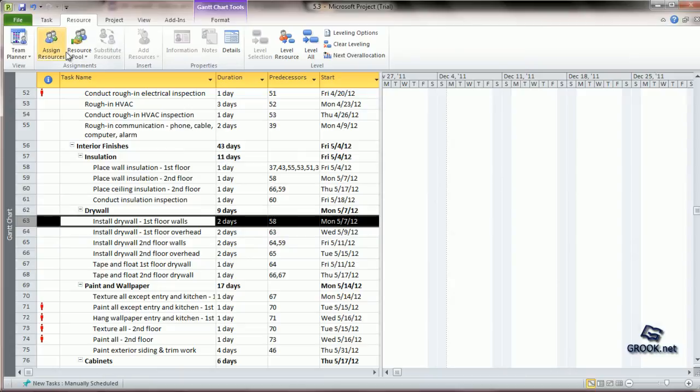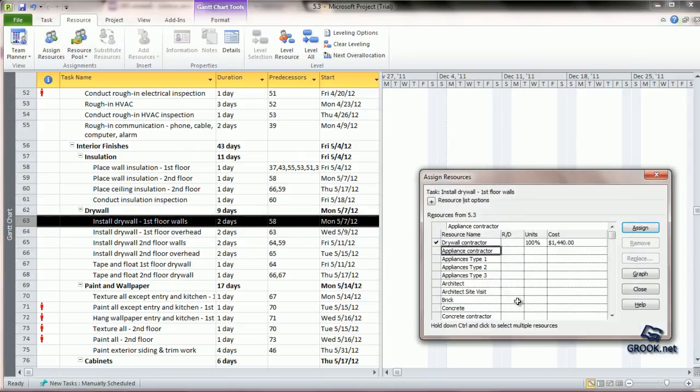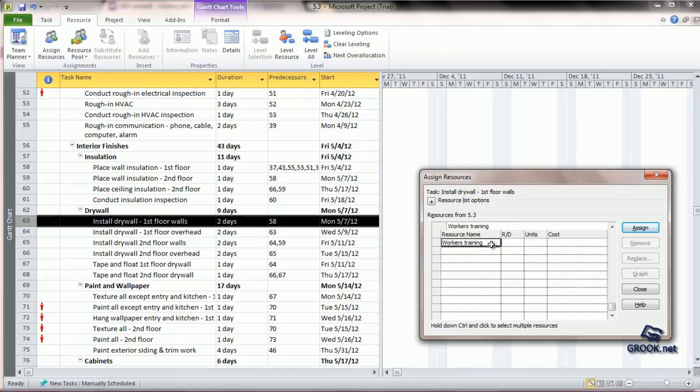Let us say we go to Assign Resources, and we choose Worker's Training, we say Assign. We can enter a different cost here.